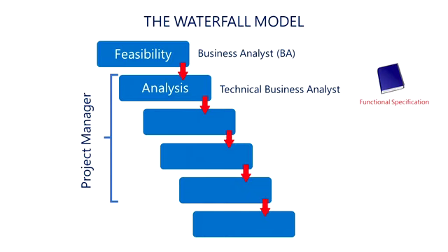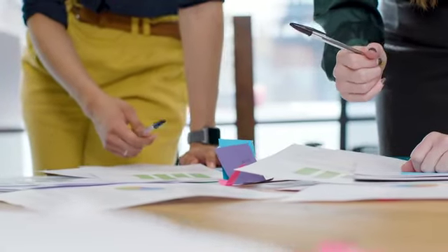The next analyst who comes on board, the technical business analyst, will make that document more technical. And so the document name will change and it will become a functional specification. So suddenly it's getting a bit more techy. It's getting nicely set up to be viewed by the technical architect. And once we've given it over to the technical architect, they themselves will suddenly do all the wizardry with technology in order to solve the problem.